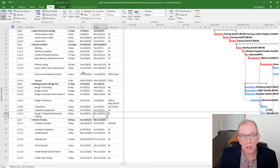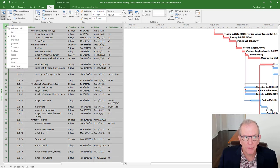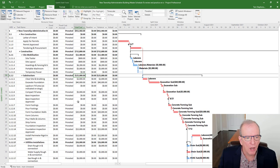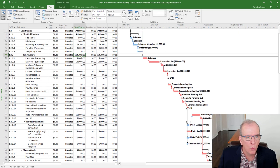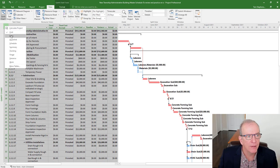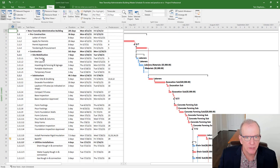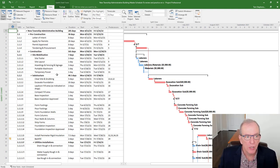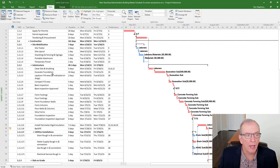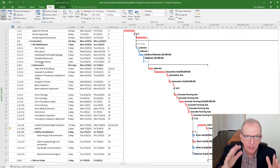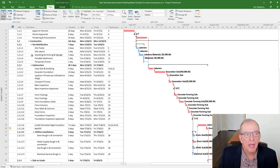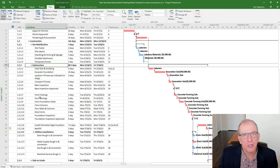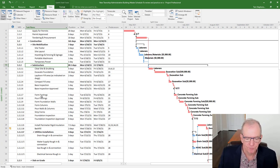So that's very helpful for those purposes. And if I'm actually doing a cost loaded schedule, like this one is I can click on my square icon box, click cost, and it'll give me summaries of the costs that are coming underneath. So I know there's $125,000 currently budgeted to the sub structure work. So it's also helpful to give me summaries at various areas of the work in those categories. And you can standardize your headings for the different types of projects that you use within your company, very helpful.